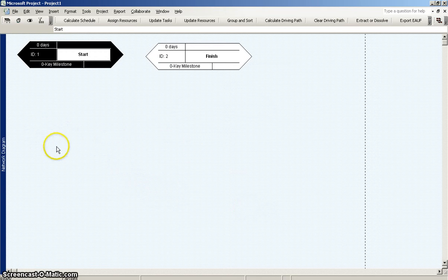So at this point, I would start to work with the team and ask the standard facilitation question of, okay, we understand the requirements around this deliverable. What are some of the tasks that we'd work on? And you can be creative here and say, if you're sitting at your desk and you're ready to commence work on this particular scope item, what would you need to have available? And that'll usually get the ball rolling, get them thinking about what needs to happen first.